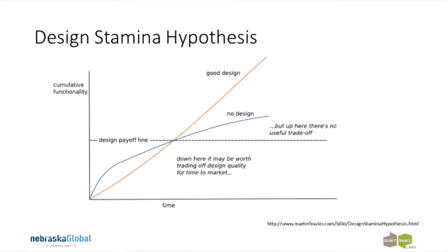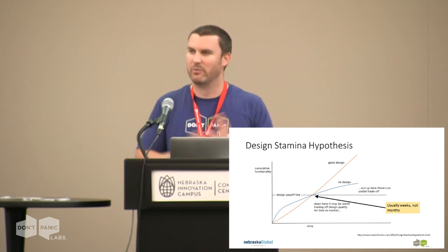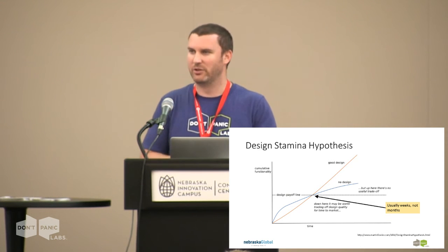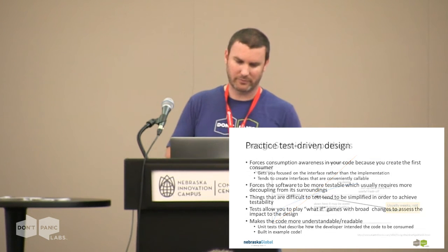And I think that design payoff line, like where does it start to pay off? I think it's probably on the order of weeks. If you're doing any project that takes more than a few weeks, you're probably better off doing some design for it. In the case of many of the things we're working on, it's often a few month adventure at the very least. It's most certainly worth spending that time to do the design so we can all have an enjoyable experience working on that code.